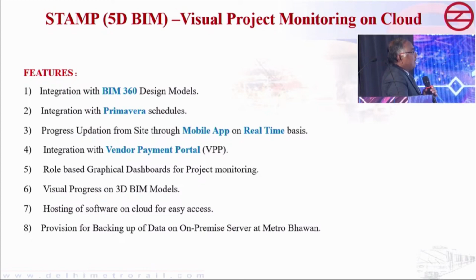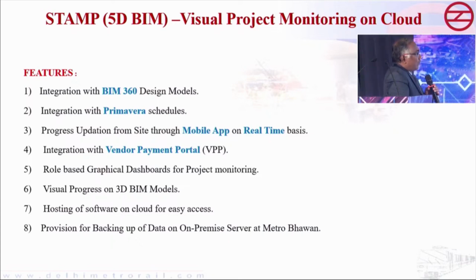For the top level, the director and MD, it is important to see what ROD dates are committed, and whether all the corridors are going as per the plan. At present we are monitoring 5 corridors, 3 in Delhi and 2 in Patna. If there is a delay, what is the amount of delay, and what are the reasons. So that is for the high-level dashboards.